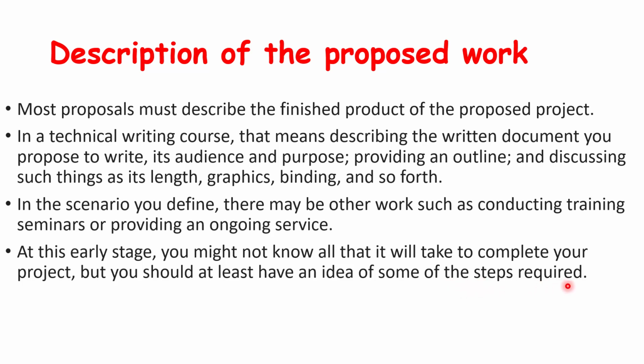So for example, if you are proposing a project of making a machinery, a pump set, improved solar pump set for the agricultural fields of Nepal, then all you have to do is you have to think about how the project might look after it is finished. So you have to imagine or visualize that you have already made a solar pump, and you have to go reverse from that. So you have to list all the equipments that you might use.